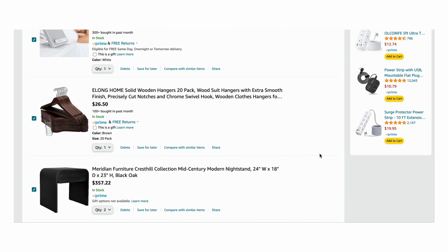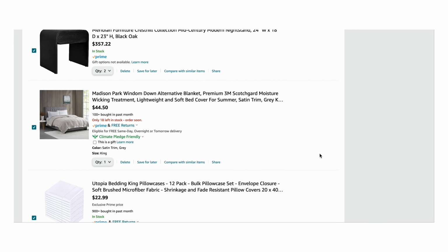This is going to vary depending on the house and the scope of work for the project, but generally we can get a proposal turned around in about 7 to 10 days, and then typically a couple days after that for the client to review and sign off and send the deposit for getting the proposal in action. Then it'll take 1 or 2 days to complete all the orders and purchases of items, and most of that will arrive within 10 days. And that's because we are intentionally choosing products that are in stock. Like a lot of people choose this awesome couch from West Elm, but you never know when it's actually going to show up, and it's not worth delaying your project for an extra 3 months just to get that couch.